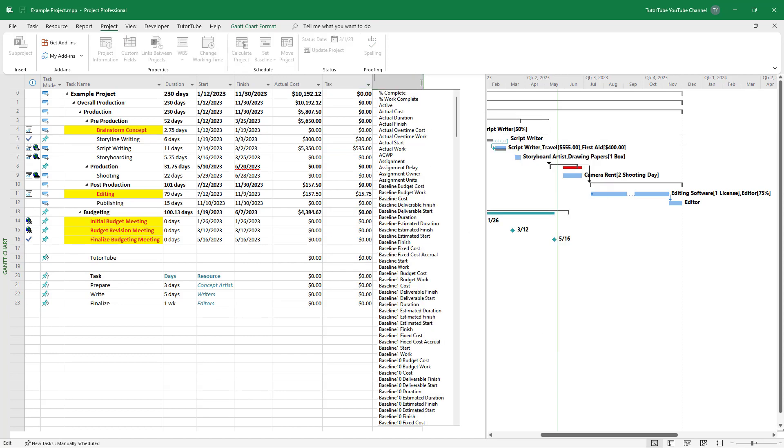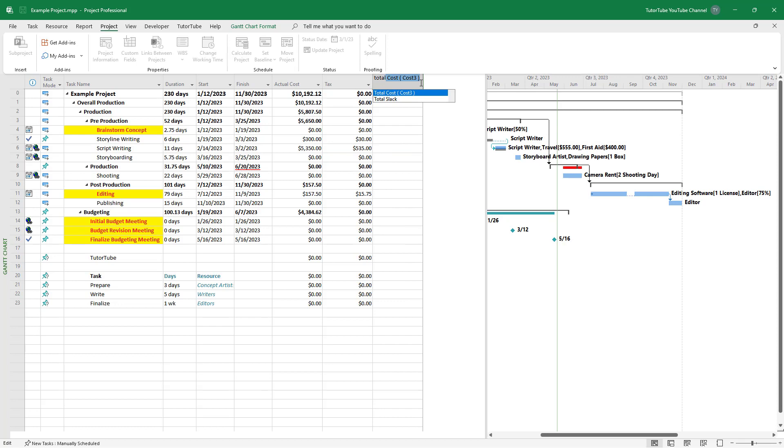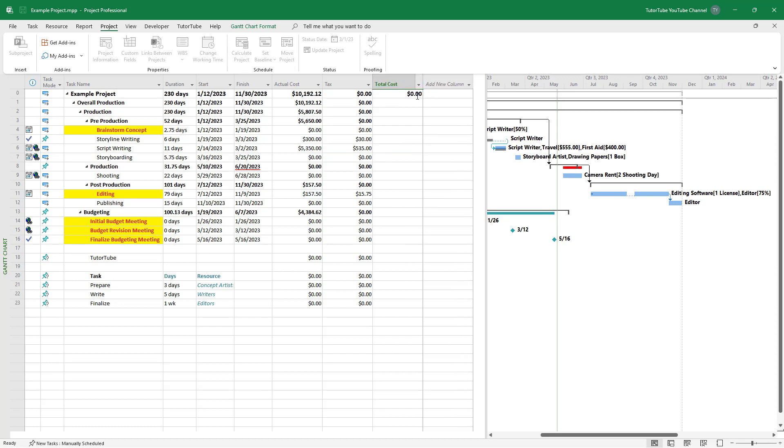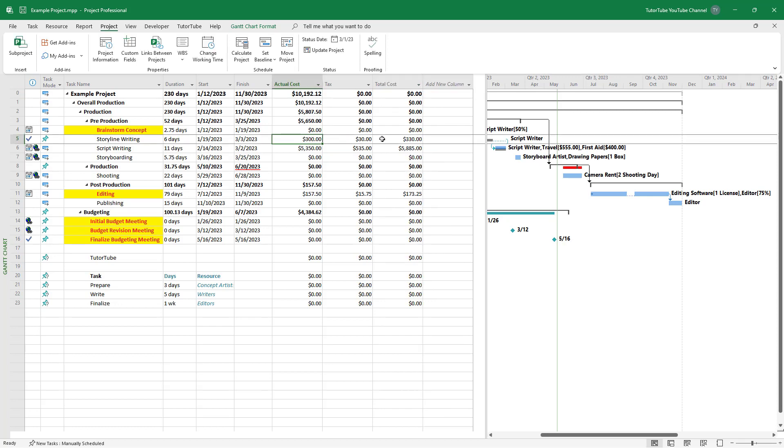And over here, if I type in total cost, then you'll be able to see this. So 300 plus 30 is 330 and you'll get the total cost over here.